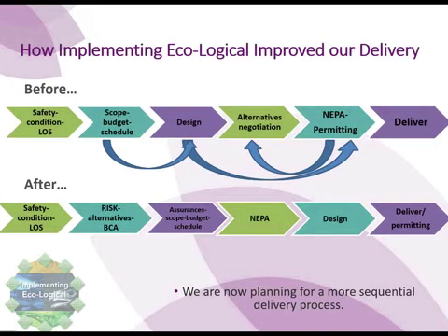So what this means is we've been able to move NEPA a little bit earlier, before design, and then we're actually doing the design when we would have before. There's just a whole bunch of work that happens first. Next, please.